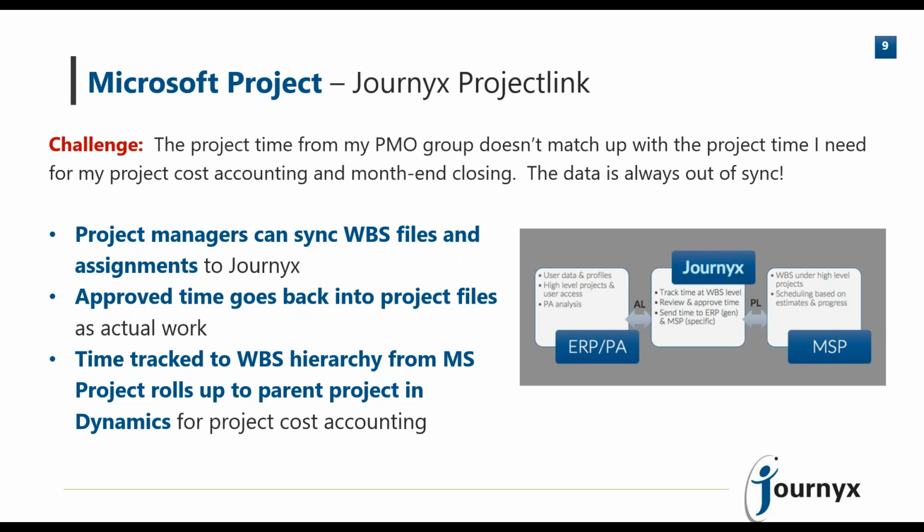So it updates the project schedules, the PMO group is able to manage their projects accordingly, and at the same time, what Project Link allows you to do is take the projects and tasks in the WBS from Microsoft Project and reparent them underneath the top level project that exists within your Dynamics solution. So for example, if I'm a user and I've been assigned to a task in Microsoft Project, I would record my time at the lowest level assignment task level.